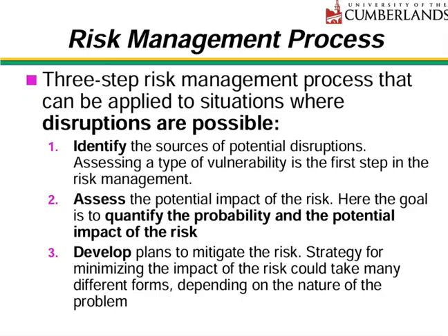This quantification is crucial because it enables prioritization. A high probability, high impact risk demands immediate attention. A low probability, low impact risk might be accepted without further action. Without this assessment, we're just guessing at priorities.